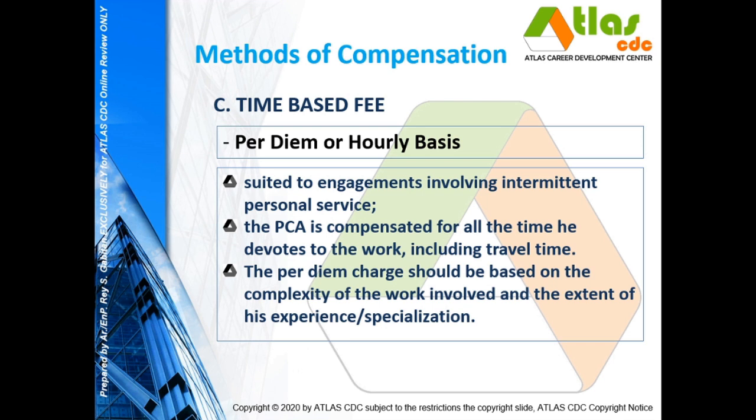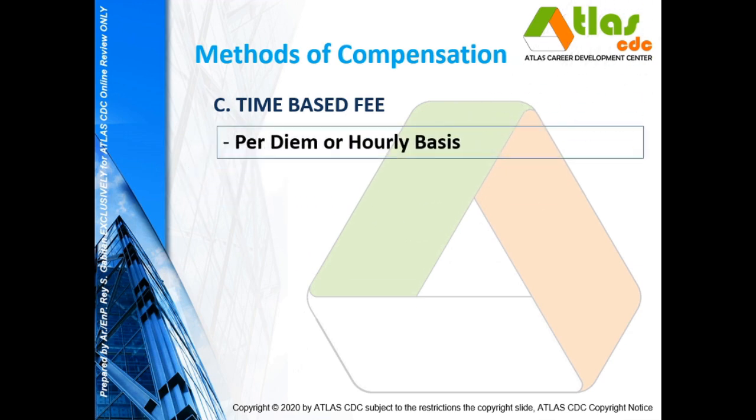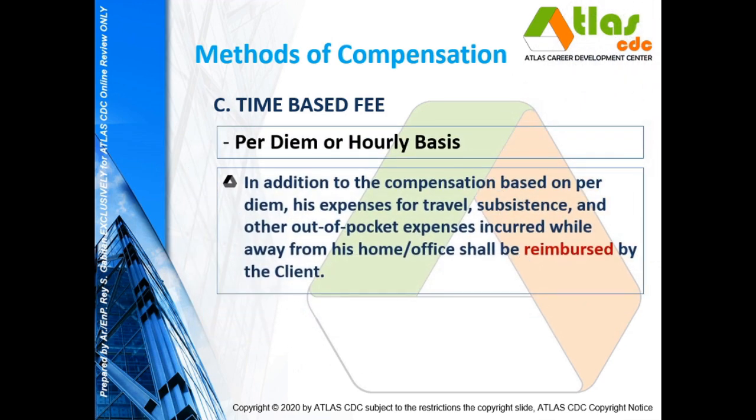So the PCA is compensated for all the time he devotes to the work, including travel time, no? The per diem charge should be based on the complexity of the work involved and the extent of his experience or specialization. Again, in addition to the compensation based on per diem, expenses for travel, food, and other out-of-pocket expenses incurred while away from the home office shall be reimbursed by the client.